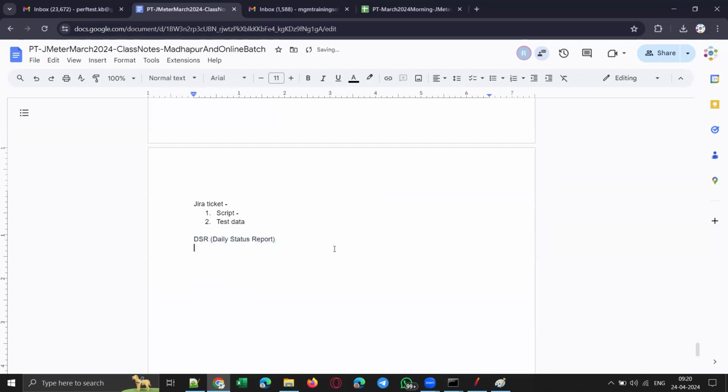Let me write it over here. In the daily status report, one thing is what is done or accomplished today. Then activities planned for tomorrow, and any blockers or impediments.